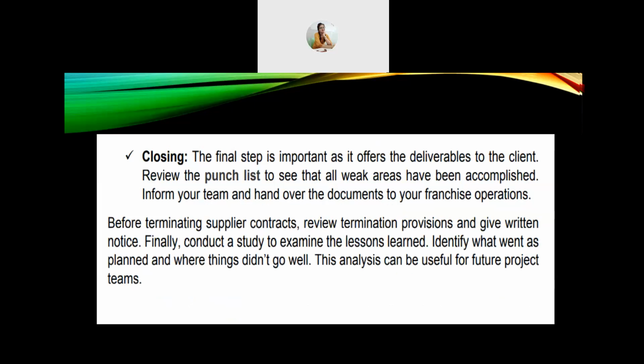Last step, closing. This is the final step. The final step is important as it offers the deliverables to the client. Review the punch list to see that all the weak areas have been addressed. Inform your team and hand over the documents to your franchise operations.